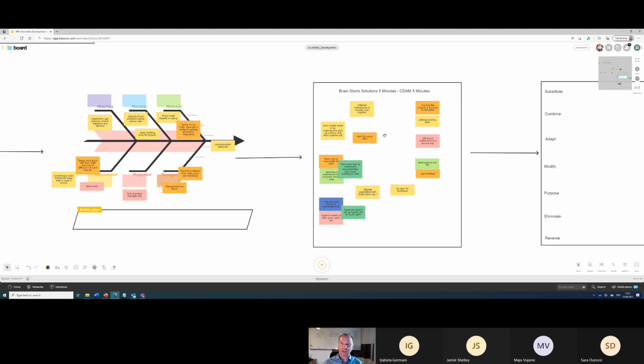Now, often when you really have a lot of post-it notes, 100 post-it notes plus or so, then you might go through and delete duplications. You don't really have any duplications on here, but on some other brainstormings, we had duplications, so then you would delete them. Now we take a moment to add. As we've just talked through those, are there any additional solutions that you might want to add?